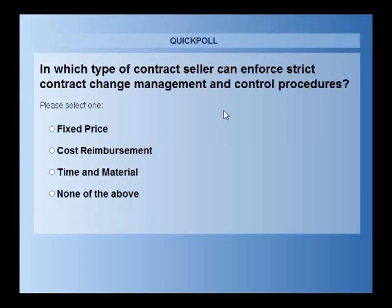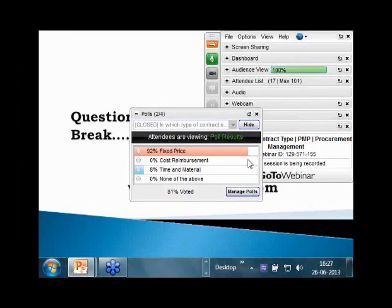A question asked: in which type of fixed price contract does the seller have to take up the cost once it has crossed the agreed price? In a firm fixed price as well as in fixed price with incentive fee, the seller has to take responsibility for delivery without changing the cost. In any fixed price contract, the cost is sealed by default unless you have a special clause — like in fixed price with economic price adjustment — giving some protection to the seller. The poll results show most agree that a fixed price contract attracts the most stringent change management process.